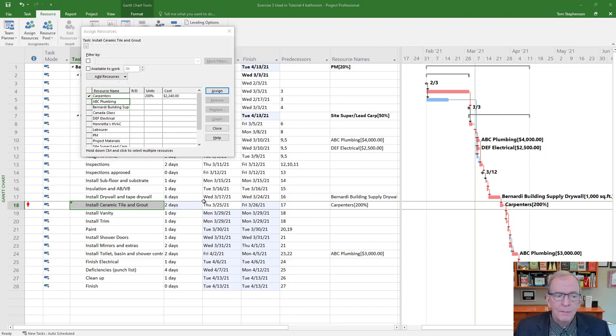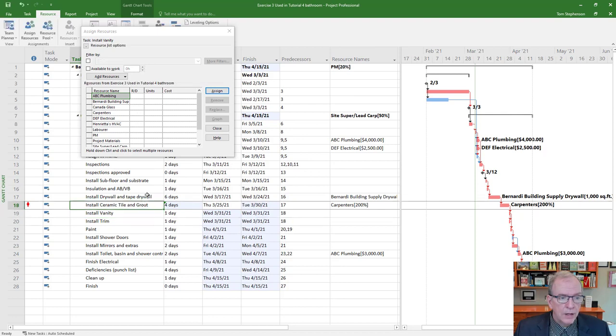You might have said, no, I meant it originally, I wanted to be 4 days. And I want 2 people for all 4 days, but that's going to double my cost, right? So that's going to double my cost. When I go back there, it doubled my cost. So there is a distinct difference, but you got to know that if it cut it short, you got to be watching for that. And then you got to decide, do I want it to be like that?